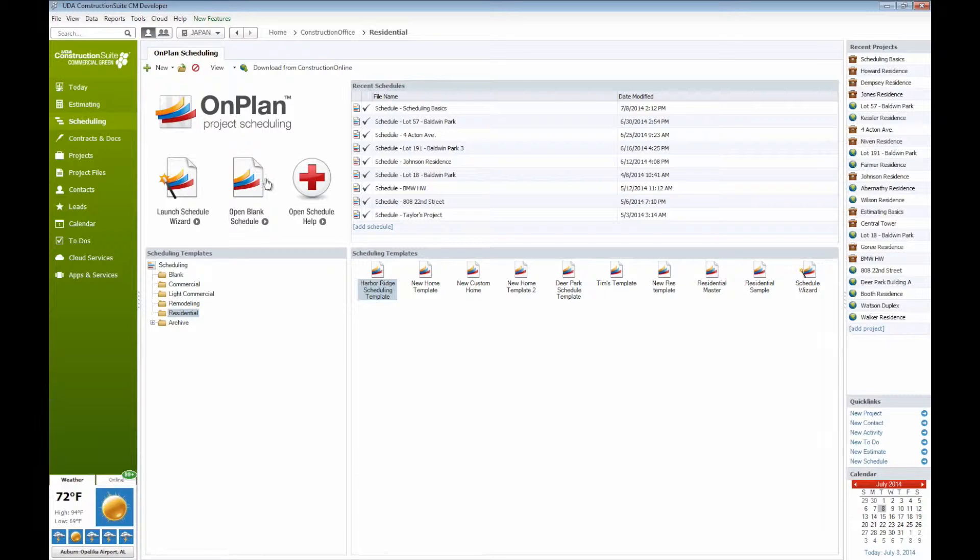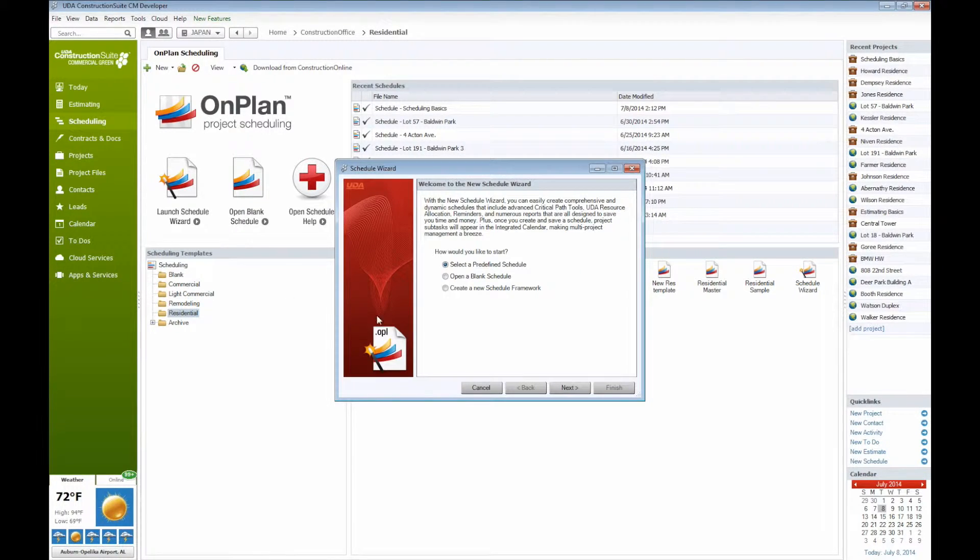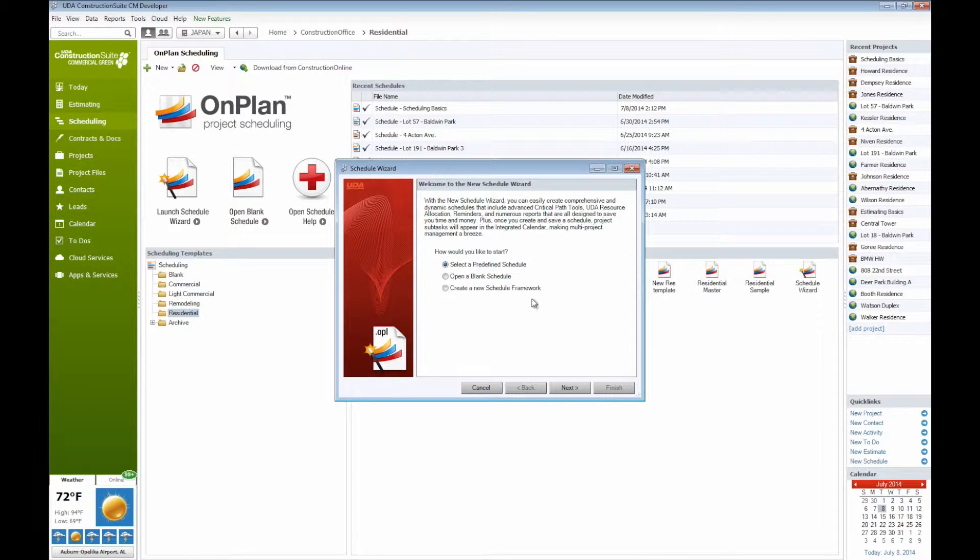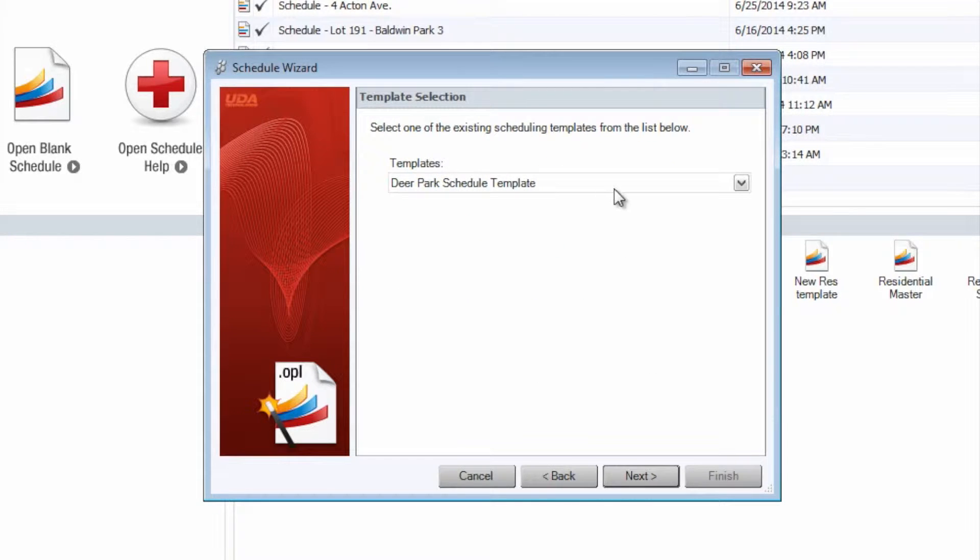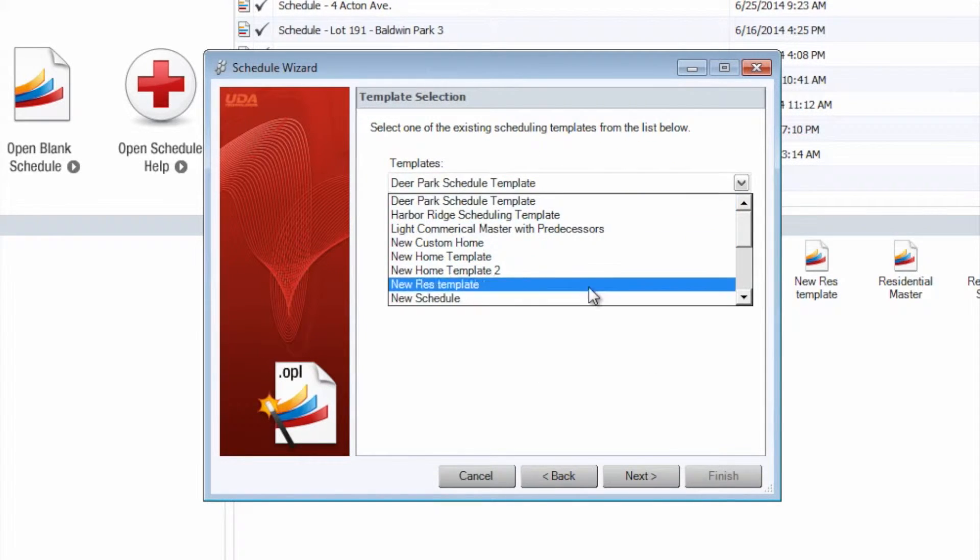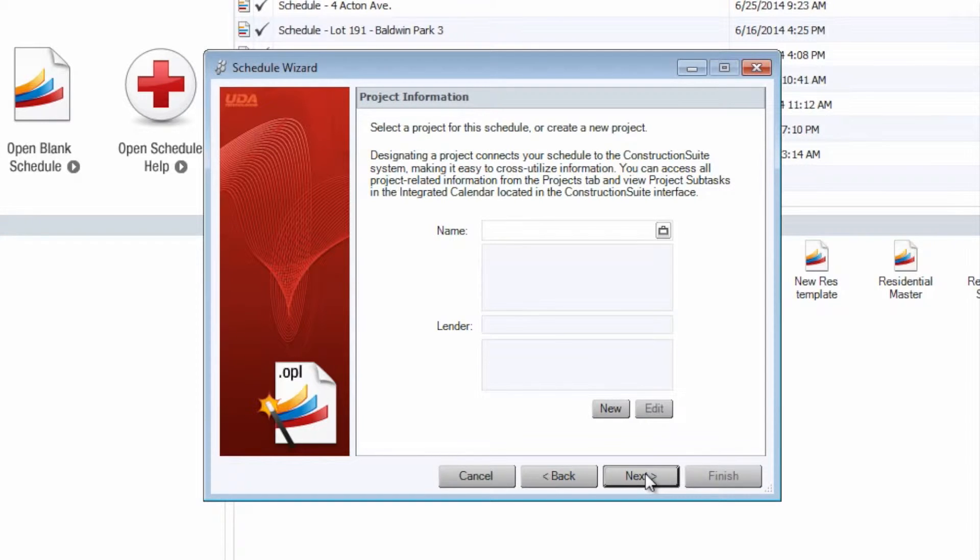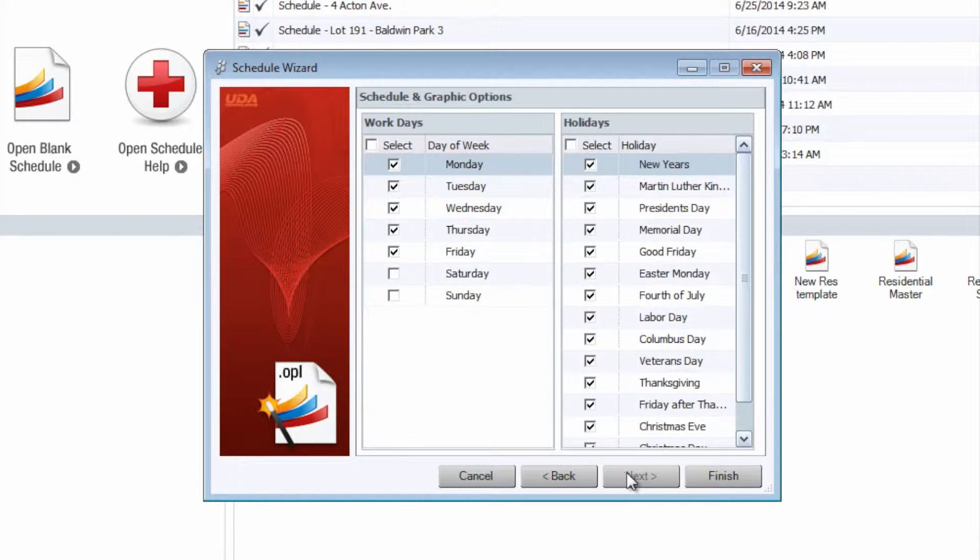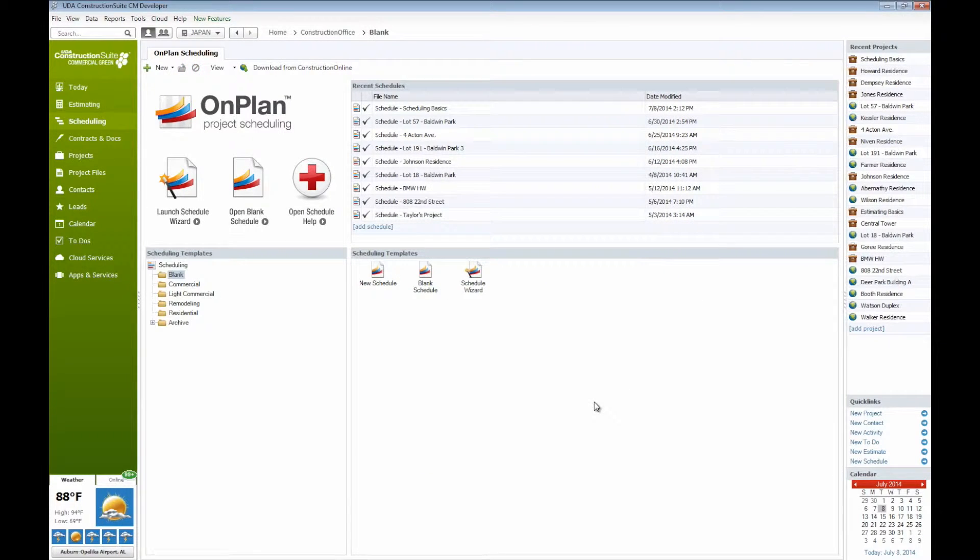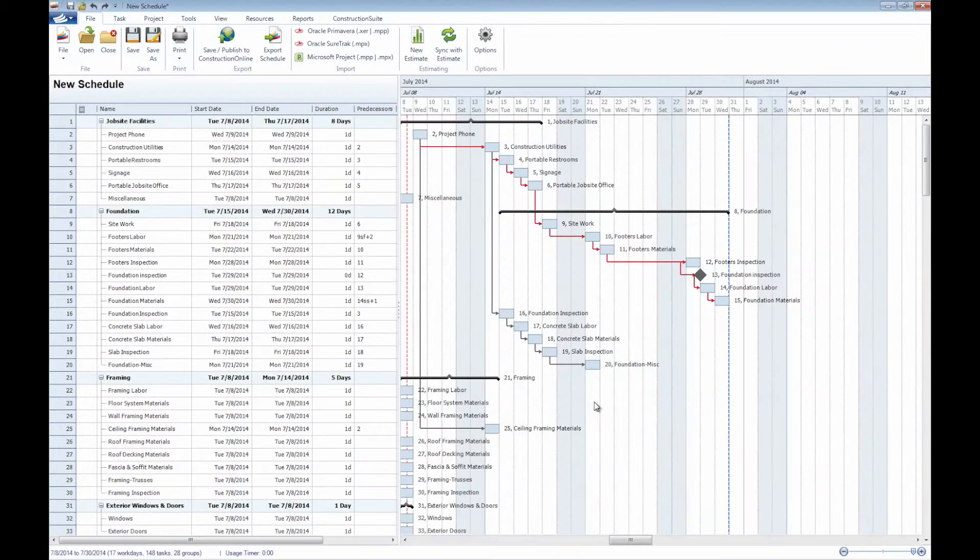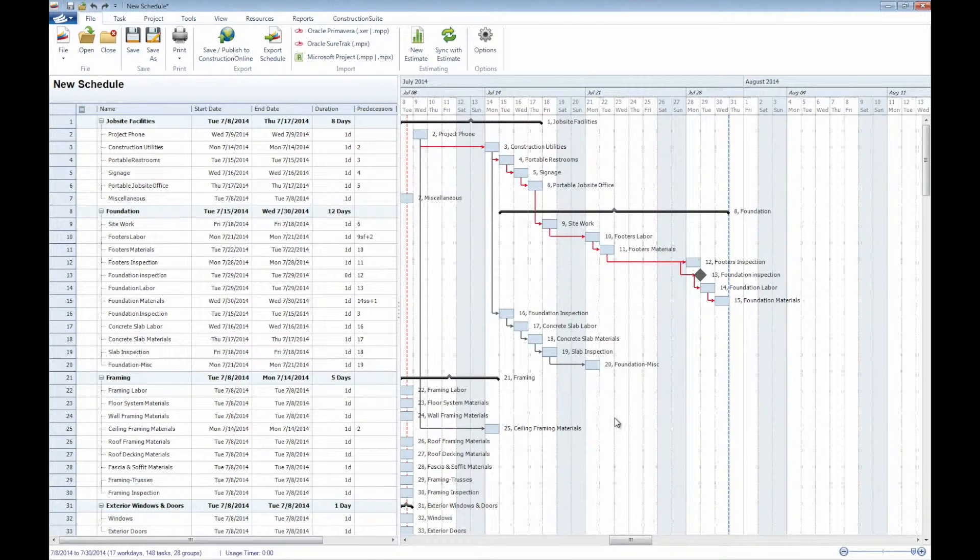From here we can either open up a blank schedule, launch the scheduling wizard as well, which the scheduling wizard, much like any of the other wizards that we also have within Construction Suite, will help give you a guide or a step-by-step process to creating a new schedule. We can select a predefined schedule here, select one of our templates that we would like to use, input any sort of project information directly into the wizard, as well as set up any of our workdays and holidays as well. By clicking finish, we'll generate this schedule directly from the framework that we had put in place here, as you can see.